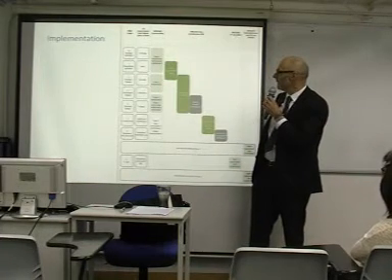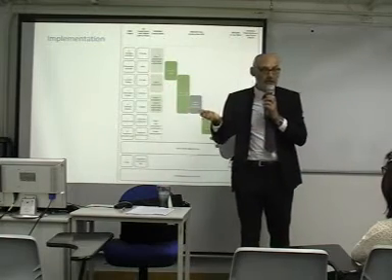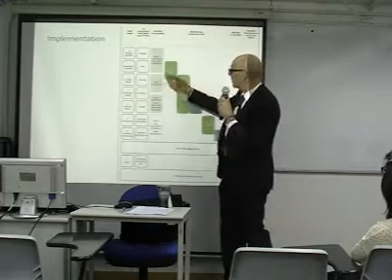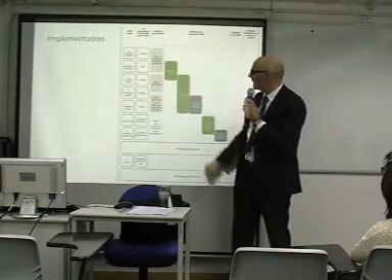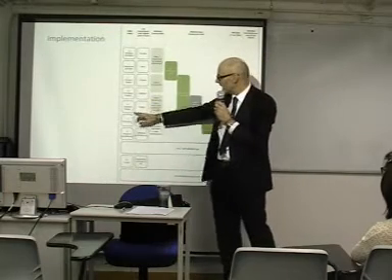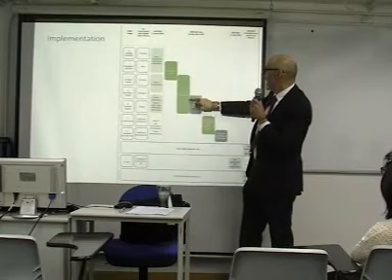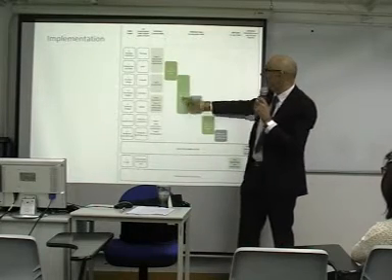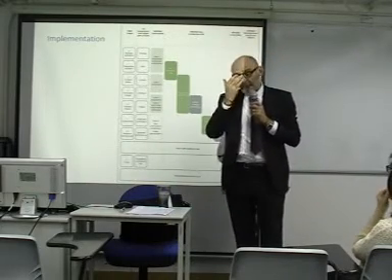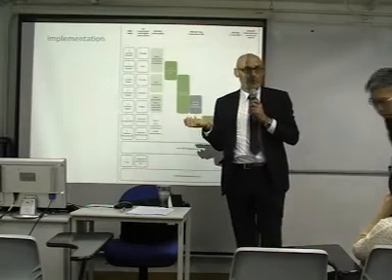So the moral of this story is that during pre-construction, during design, we are advised to make use of BREEAM new construction with the design phase. So approximately once you've gone through strategic definition, then in preparation and brief, concept design and developed design through to technical and construction, we're introducing pre-assessment and then the actual design process of applying BREEAM. So in your project you may want to consider introducing BREEAM from first principles. So it's not a bolt-on.